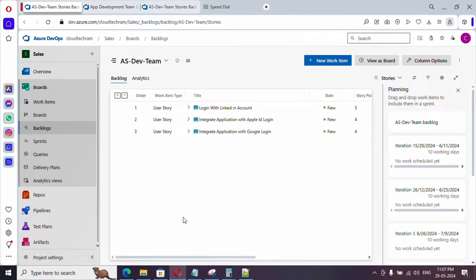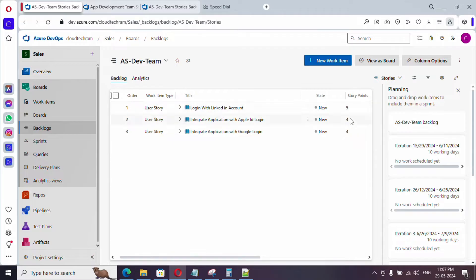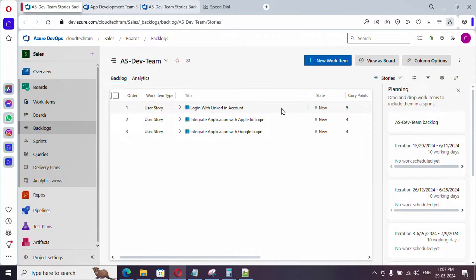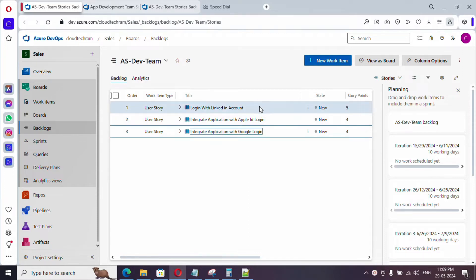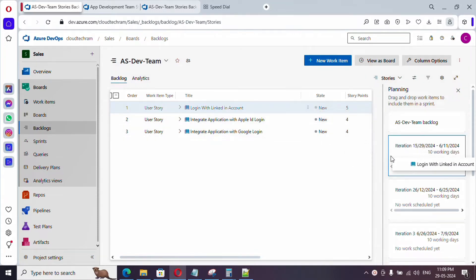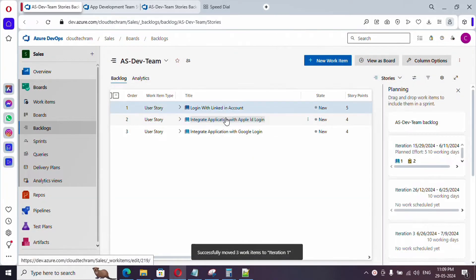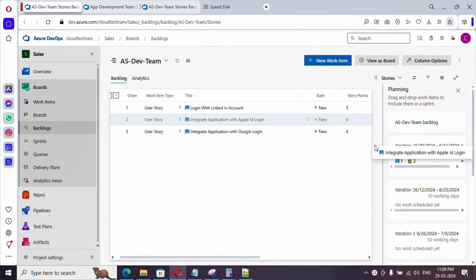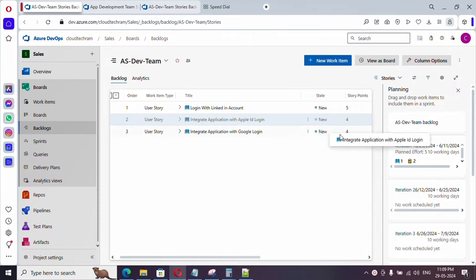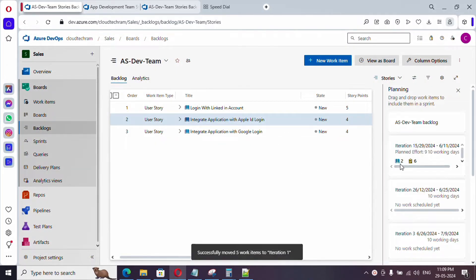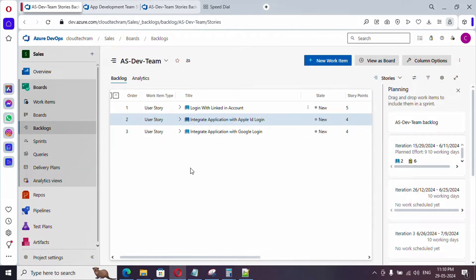Based on our previous sprint experience, the product backlog owner will suggest that the team is capable of completing nine story points per sprint. So the product backlog owner will suggest pushing these two user stories into the current sprint, since they total around nine story points, which the team is capable of completing based on previous experience. We will then tag these two user stories to Sprint One.